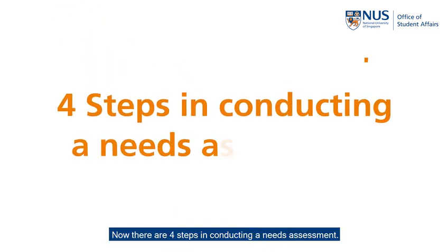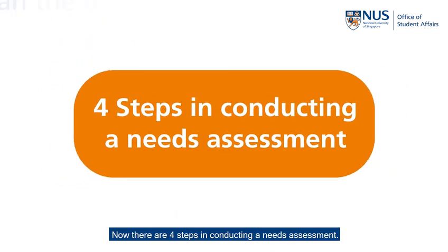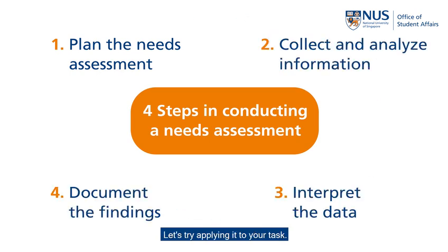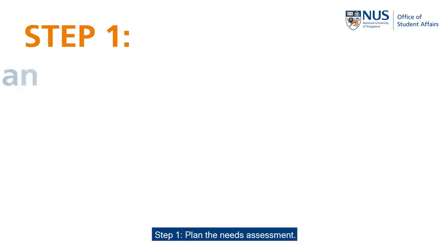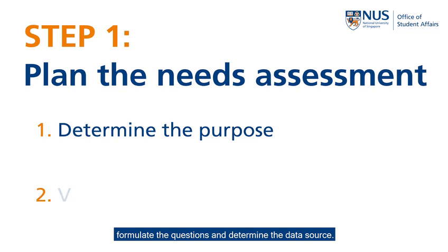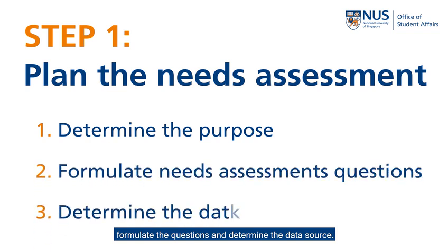Now, there are 4 steps in conducting a needs assessment. Here's an overview of the steps. Let's try applying it to your task. Step 1. Plan the needs assessment. You need to determine its purpose, formulate questions, and determine the data source.